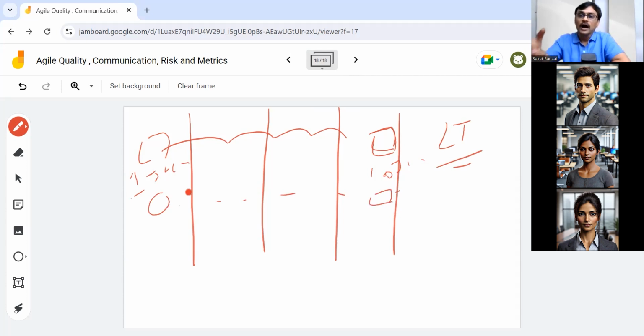Now, it is not about saying I only worked on it for 1 day. Doesn't matter. You worked on it for 1 day, 2 days, 3 days, 4 days, 5 days. Doesn't matter. It took 10 days in your development cycle. That's the lead time. So this is a good tool for flow-based work, and it's a customer-oriented thing. The customer says, we give you a request and you take X amount of days to finish it. That's the lead time.